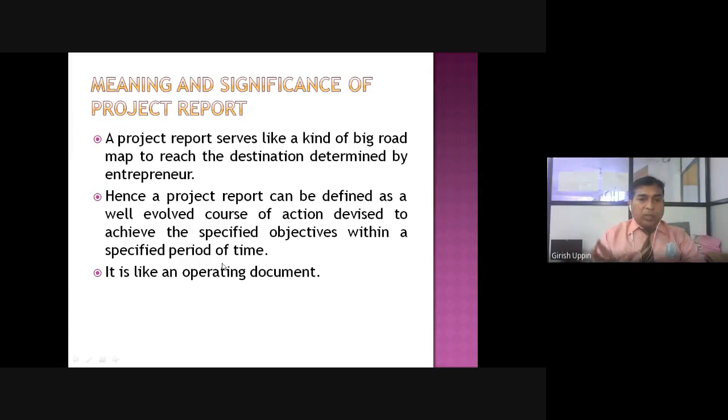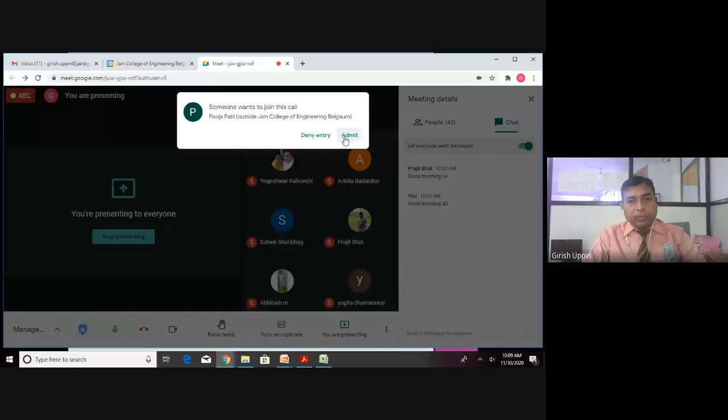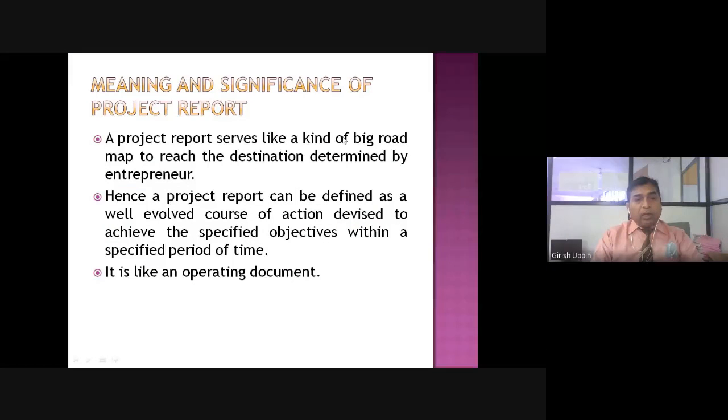Whatever period of time is chosen, there should not be any change in that, right? If it finishes early, it is good. Any project which is delayed will have additional overhead costs, and sometimes that makes the project itself unviable because of the increased timeline. An increased timeline makes for an increased capital requirement, an increased budget. Sometimes it will make the project unviable. So the period of time is very important when you are doing any kind of project. The period is very, very important.